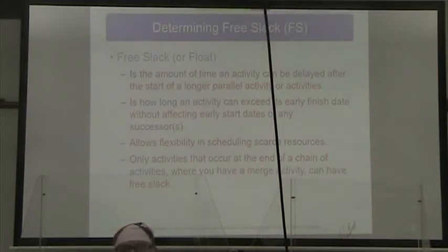So that could be that we started at the same time as the parallel activity, and then we just have slack at the end, or that could be we delay starting it and then go up to the late finish, or any combination of that. Start a little late, finish a little early.